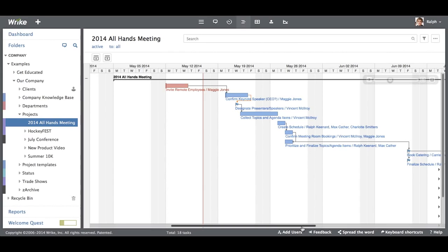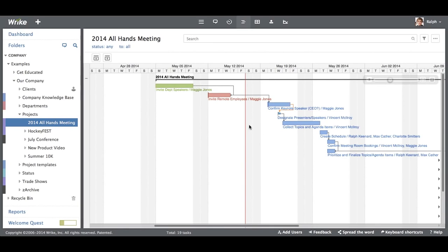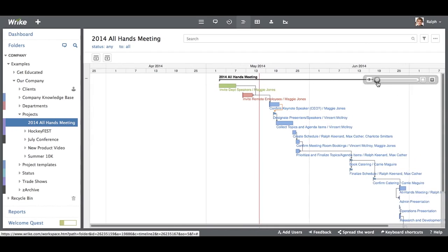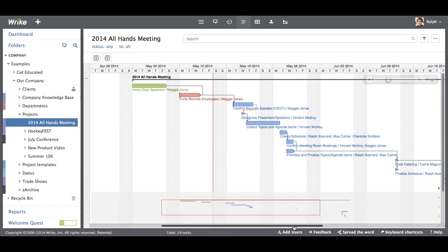This timeline is our Gantt chart, and it's a really fantastic visualization of your project and its schedule. The basics of this view are that your tasks flow from the upper left-hand corner to the bottom right, depending on scheduling. You can zoom out or in depending on the time frame that you want to see. The length of these bars is indicative of the task duration, and they are color-coded by status: complete, overdue, still active. Deferred would show up in purple, and canceled are grayed out.